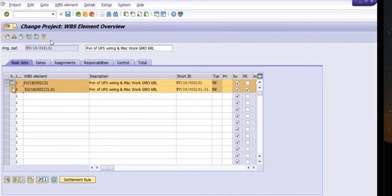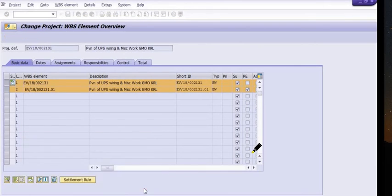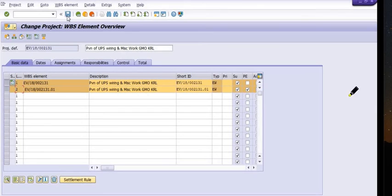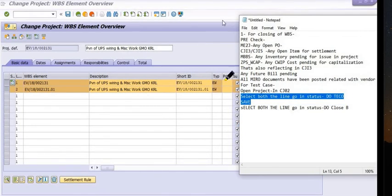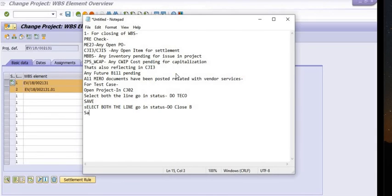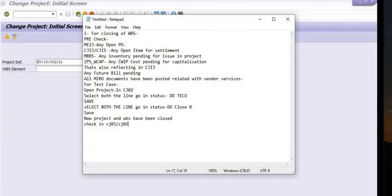TECO status has been applied. Again select both line items, go to Status, and click on Close B. Confirm by clicking OK. After Close B, check the status — the system status is now CLSD for both the WBS and project definition.